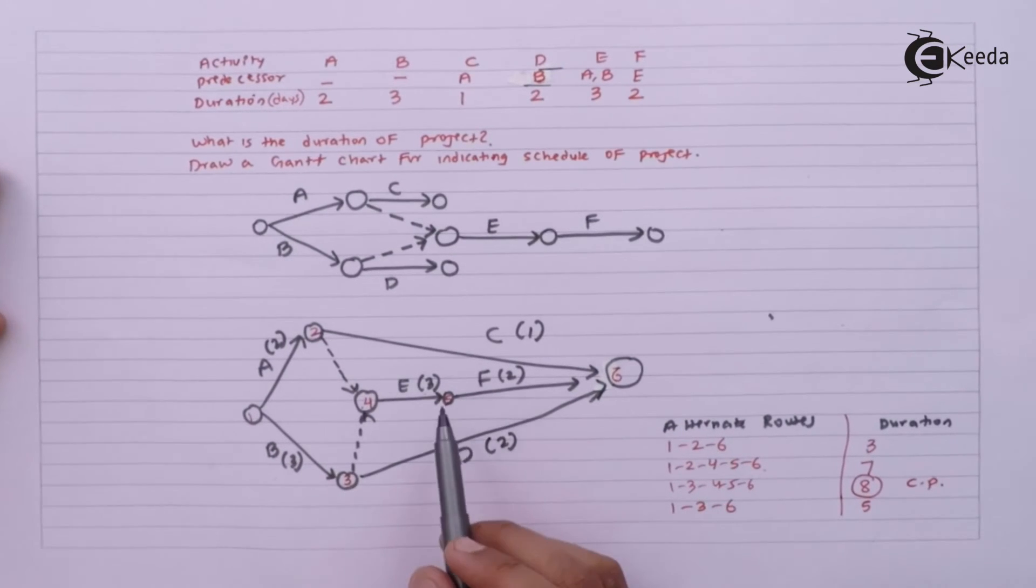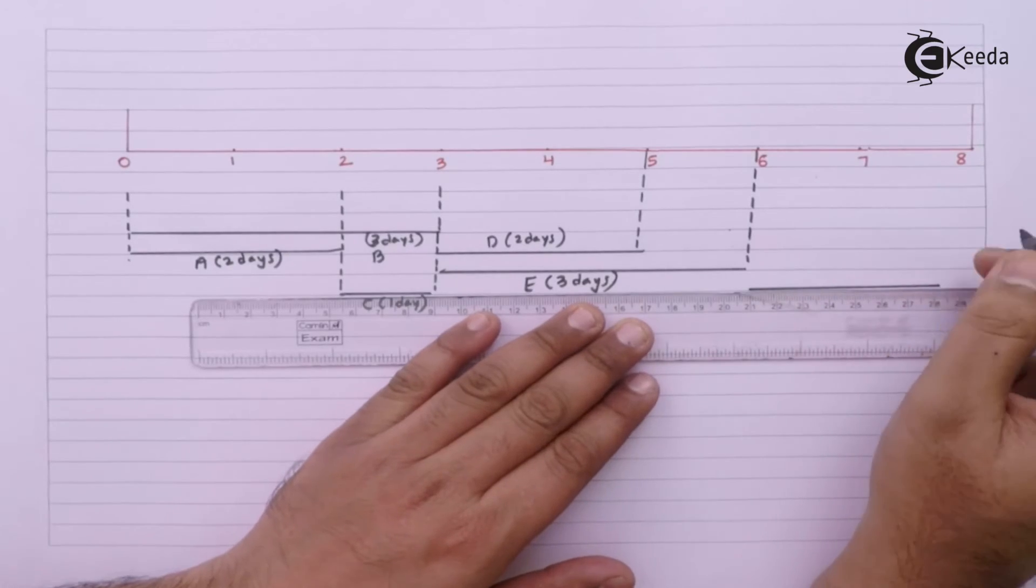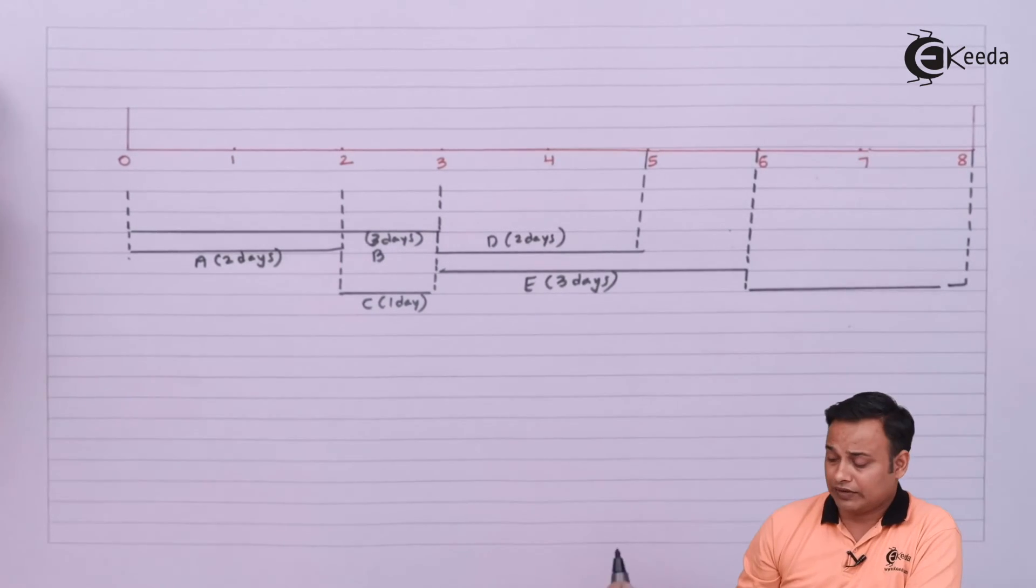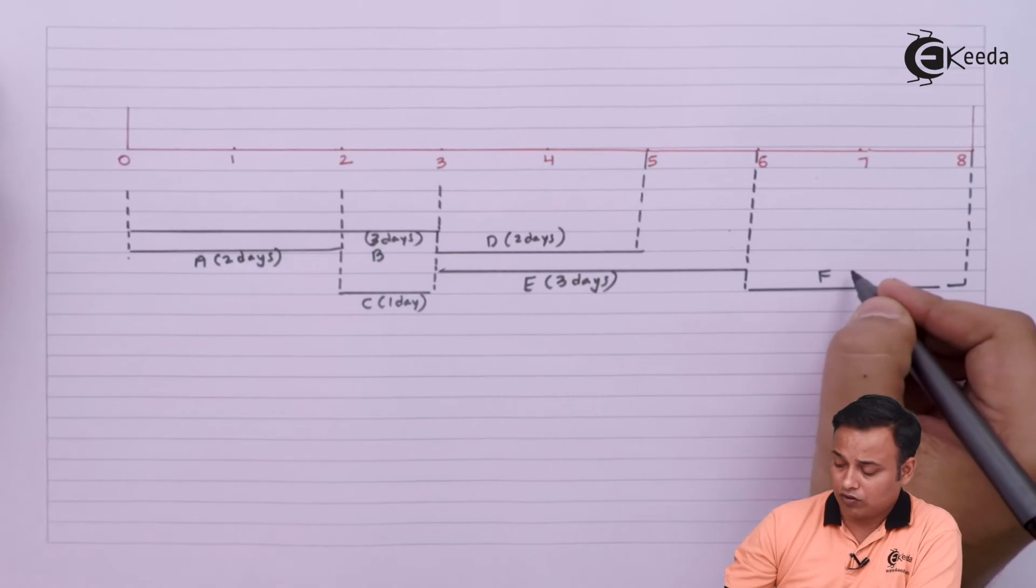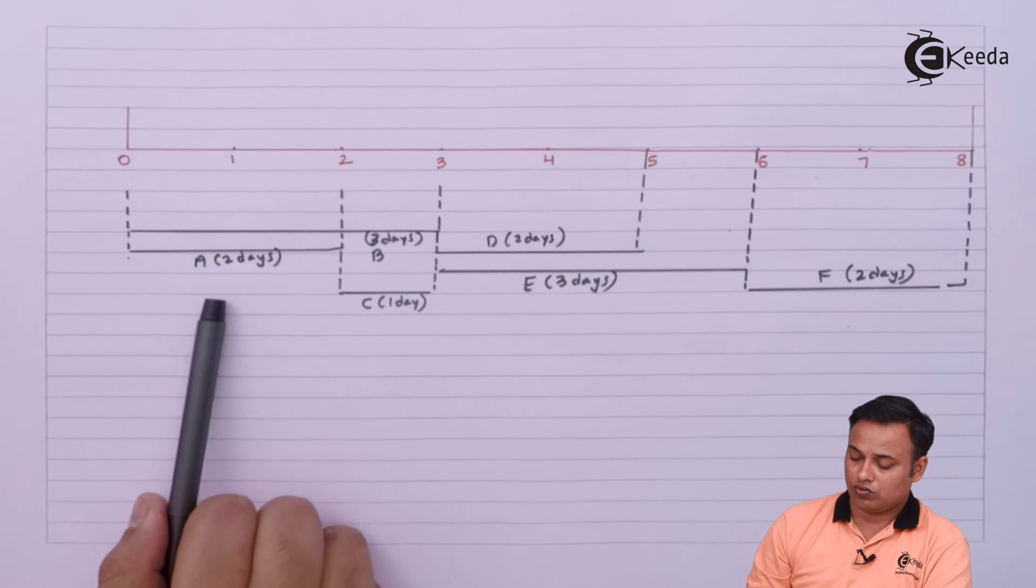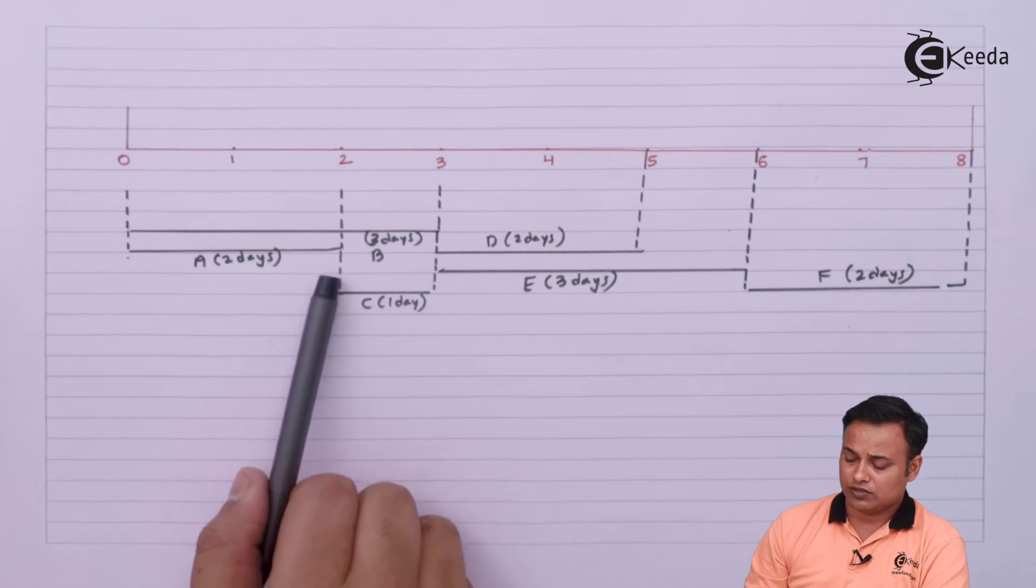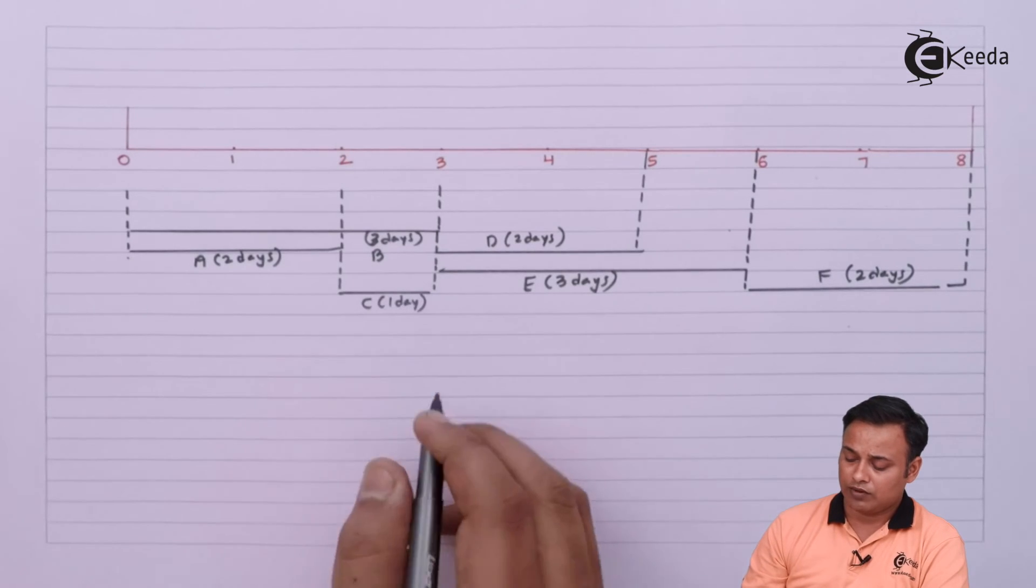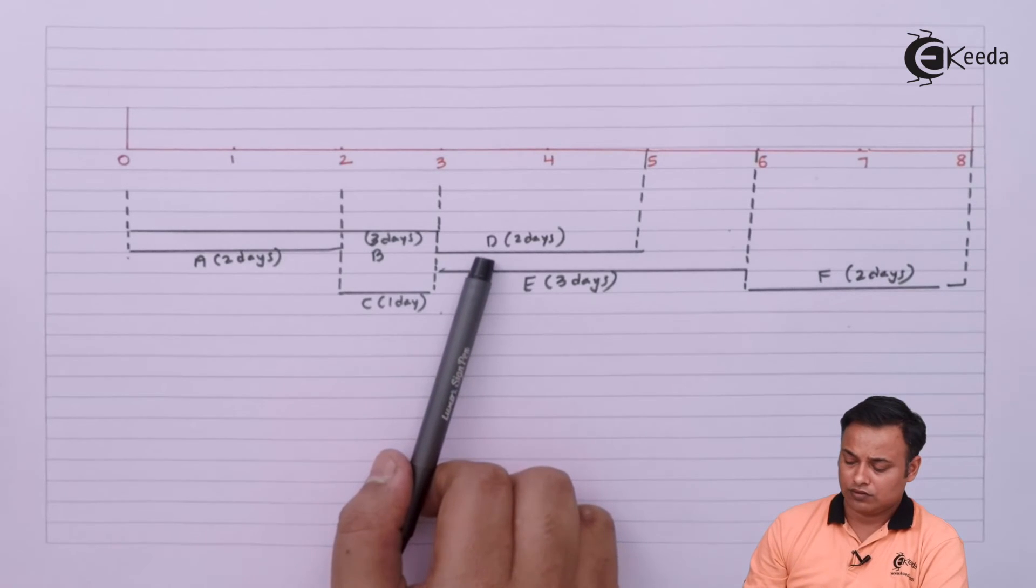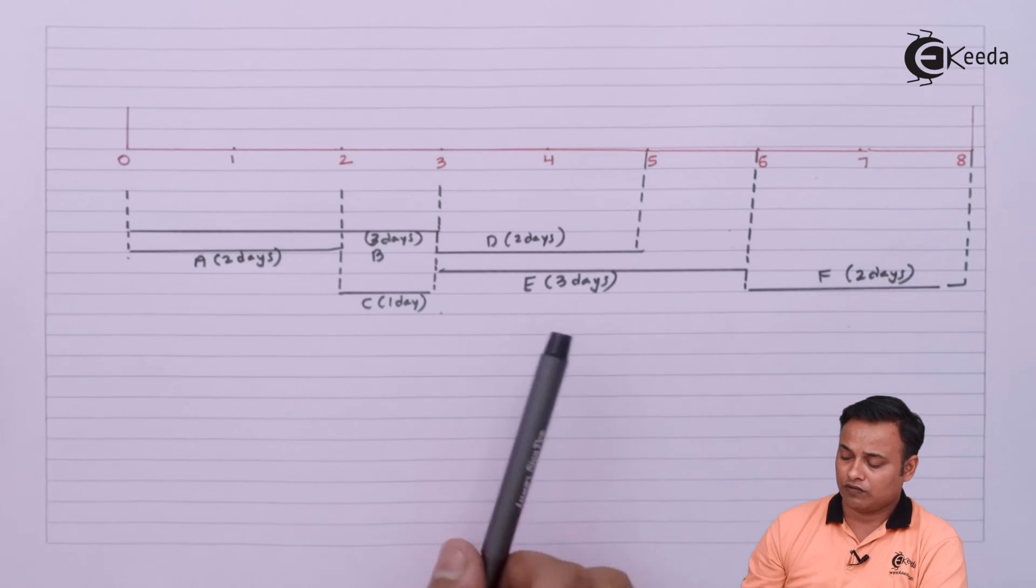Now F can start after completion of E. F can start after E for 2 days. So my final activity will be F for two days. At this point I am done with A, B, and C. Then I started with E for three days and then I started with F after completion of E for two days.